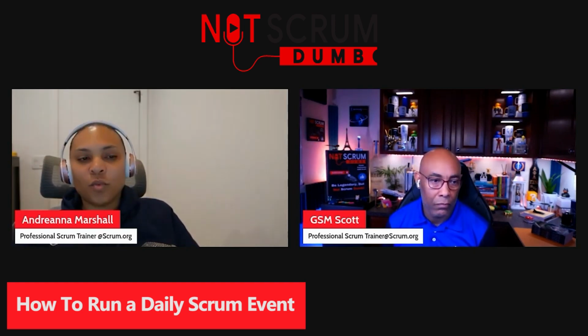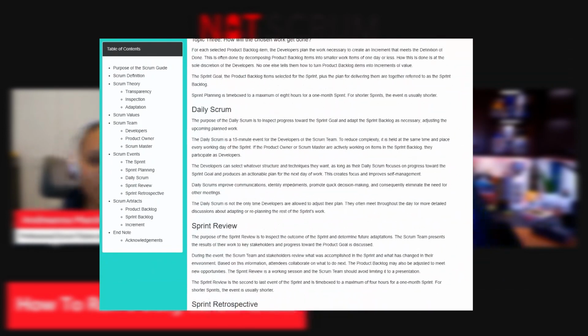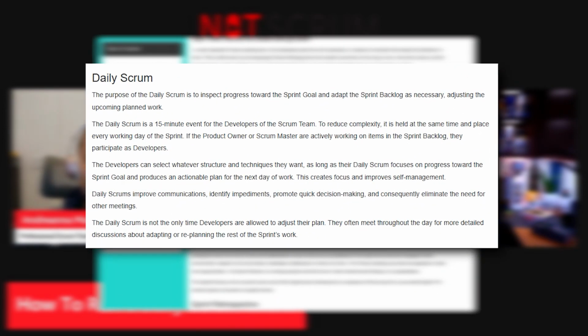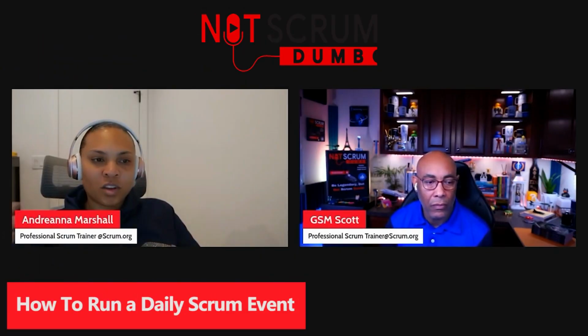All right, so the first thing, what is the daily scrum? It's a 15-minute time-boxed event for the developers to plan for the next 24 hours. The event is designed to be quick, efficient, and focused on progress toward the sprint goal. All right, so Scott, you want to talk a little bit more about the purpose of the daily scrum?